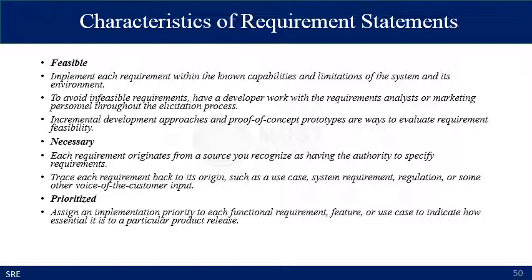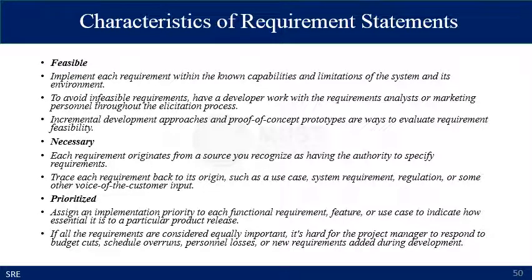Priority is also an important characteristic of the requirement specification, and each requirement should specify its priority. You assign an implementation priority to each functional requirement, feature, or use case to indicate how essential it is to a particular product release. If all of the requirements are considered equally important, it is hard for the project manager to respond to budget cuts, schedule overruns, personnel losses, or new requirements added during development.